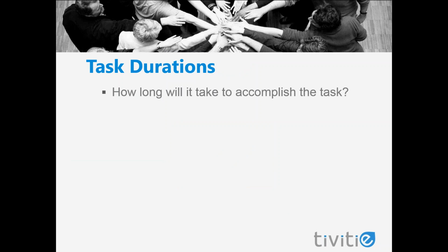If I'm estimating using task durations, there are a number of key points that need to be kept in mind. The duration should be estimated by the work performer. They are always the person that's going to know best how long it's going to take them to complete a task. If that person's not available or hasn't been assigned yet, you should later validate the duration with them once they've been assigned to the project.